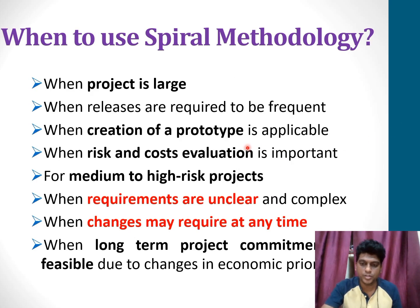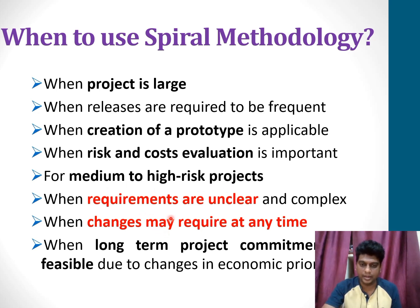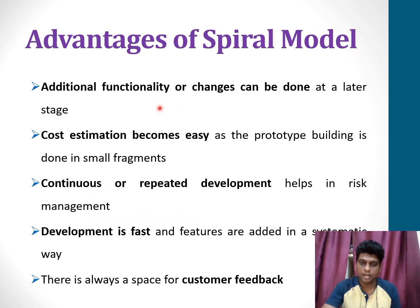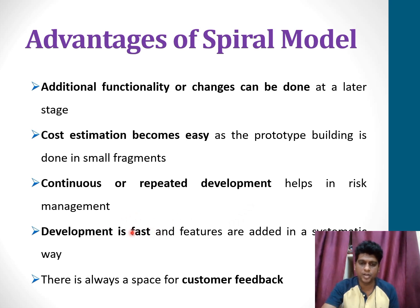This model supports risk handling, and the project is delivered in loops. Each loop of the spiral is called a phase of the software development process. The spiral methodology is used when the project is a large one, when creating prototypes is needed, when risk and cost evaluation is very important, and it is applicable for medium to high risk projects where requirements are unclear and complex. Changes can be done even at later stages.